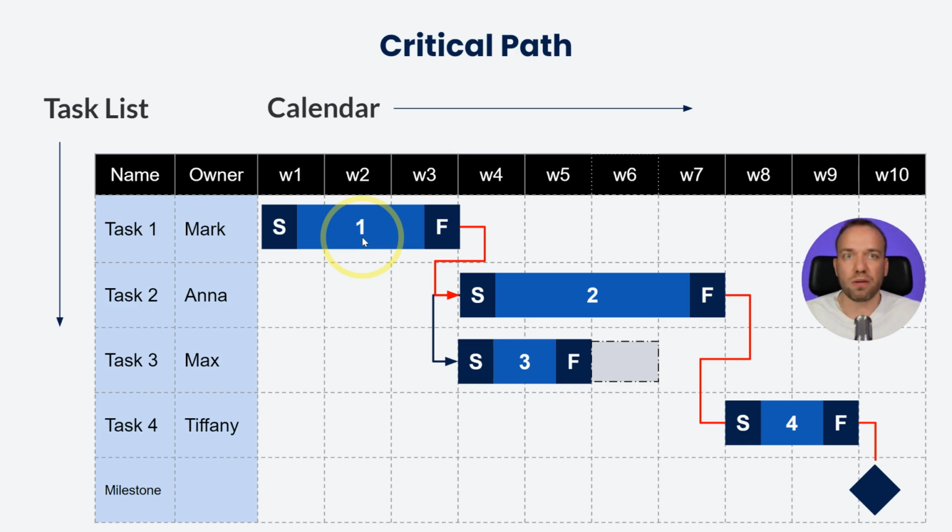This is a form of compressing the critical path. We covered what is critical path in the previous lecture. This is the longest path through the project, which essentially determines the duration. Now the question is, how do you compress that? How do you make it shorter? Sometimes in life you have to make things shorter. I know it's counterintuitive, but there you go. Shorter sometimes is better. So fast tracking has to do with doing things in parallel.